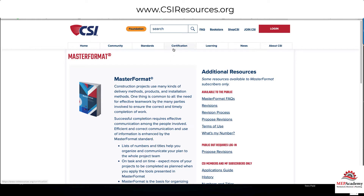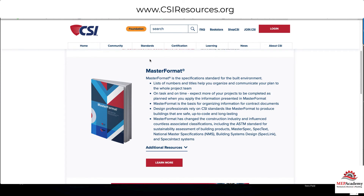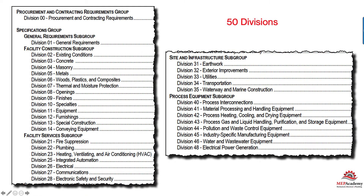First, you need to know that most construction specifications follow the CSI format, which is divided up by divisions just like chapters in a book. CSI stands for the Construction Specifications Institute. Each division covers a specific trade specialty or contract requirement. The specifications are broken down into 50 divisions. Some of them are reserved for later expansion, but you'll see Division 00 — Procurement and Contracting Requirements — which is important to read, and Division 01 — General Requirements.